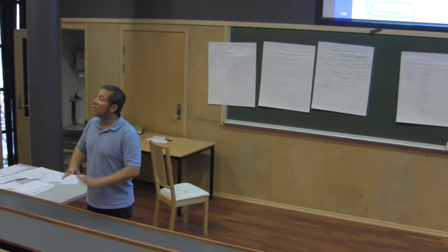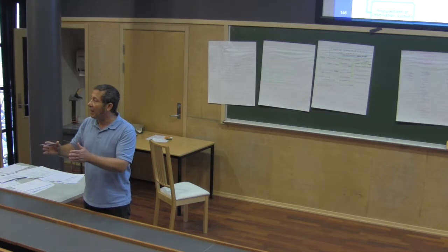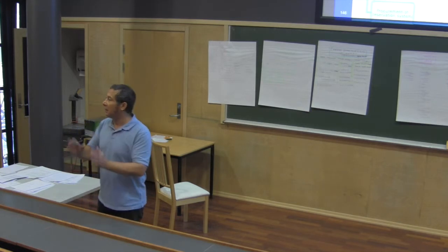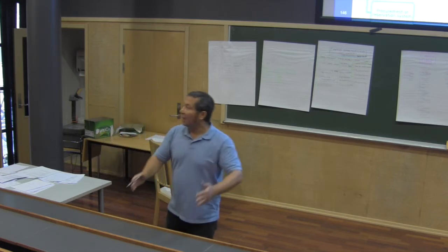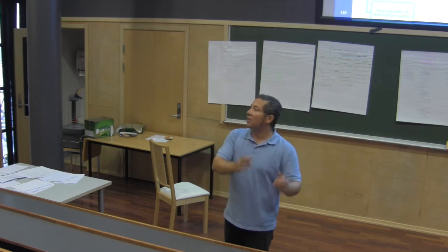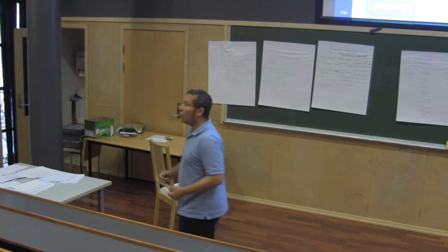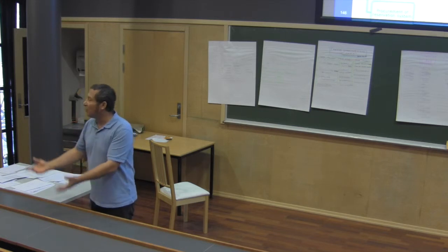Is this supposed to be a work package? When I put coordination and monitoring, maybe this group said, okay, in order to make sure that we will be friends all the time, we will have monthly meetings. In these monthly meetings, we will meet and discuss and come up with recommendations and action plans. So that's a task, that's work you will have to do. Then it's included.